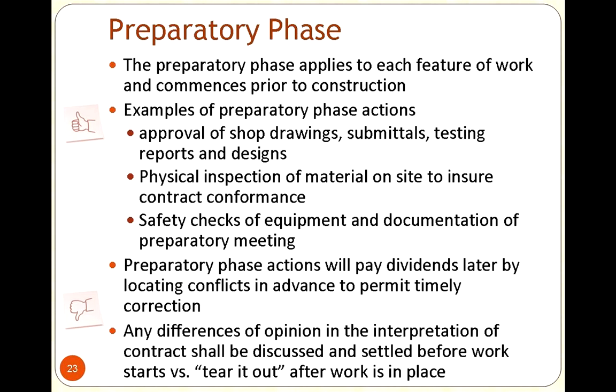What it came down to was that a lot of schools were having their boilers upgraded in a performance contract, but they didn't specify the boilers, and they didn't put them into the specifications of the schools that were out there. The boilers that got installed were not for schools. They were for laundromats. You want to talk about hell on wheels. I mean, it was just out of control what was happening.